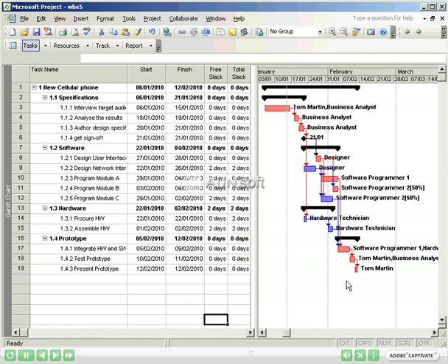How much slack is available for non-critical tasks? The lower the ratio of slack to overall duration of the task, the higher the probability that the task will not complete on time. For example, in Assemble Hardware, we have 2 days of slack for a task which we estimated will take 2 days to complete. This means that it can start 2 days late and still complete without affecting the critical path, or it can start on time and take twice as long as we had estimated and still not affect the critical path. This means that it has a high probability of completing within the slack, and therefore low sensitivity.